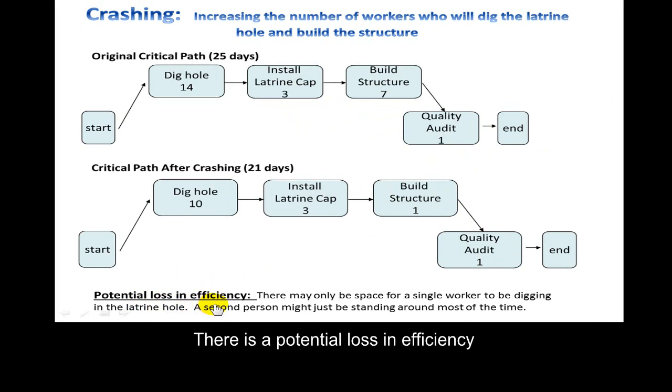There's a potential loss in efficiency when you crash. There may only be space for a single worker to be digging in a latrine hole. A second person may just be standing around most of the time.